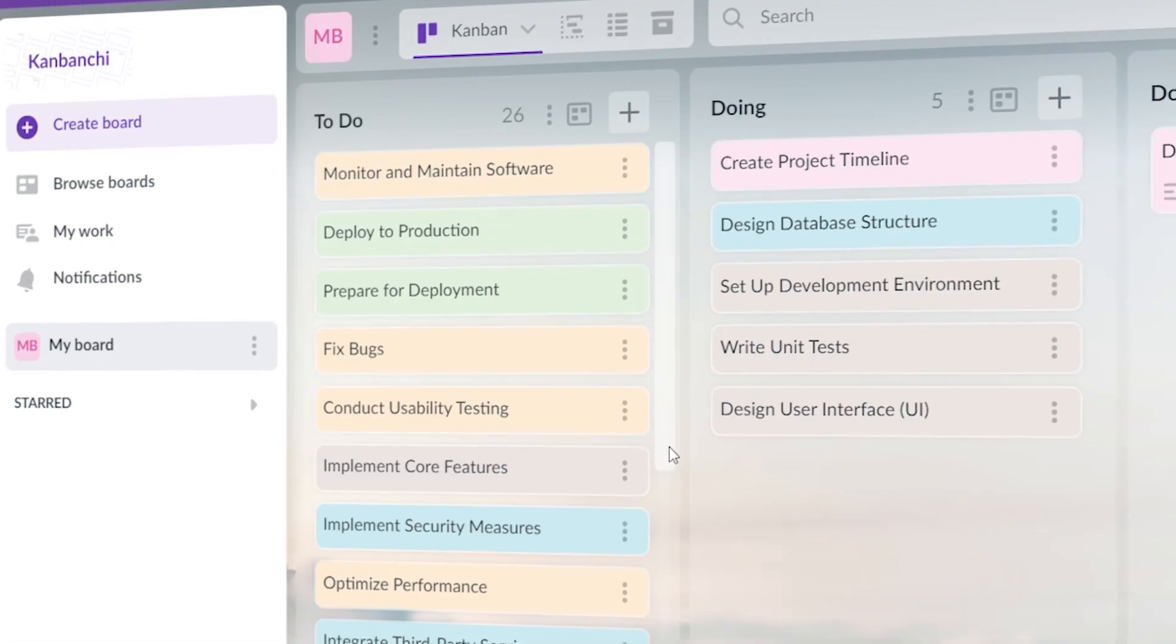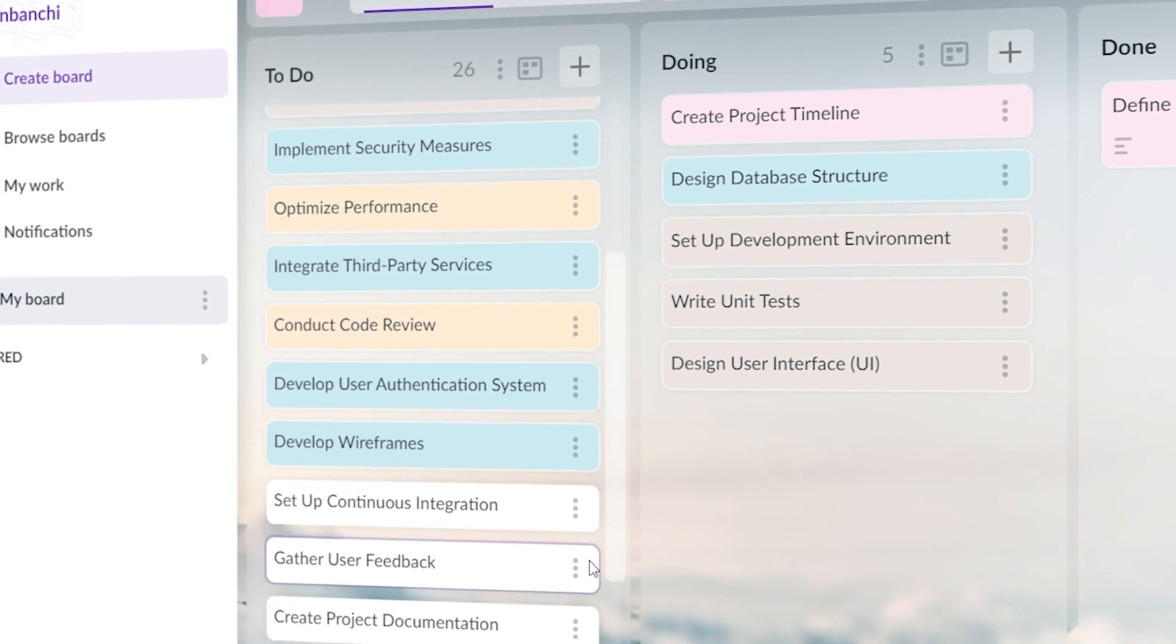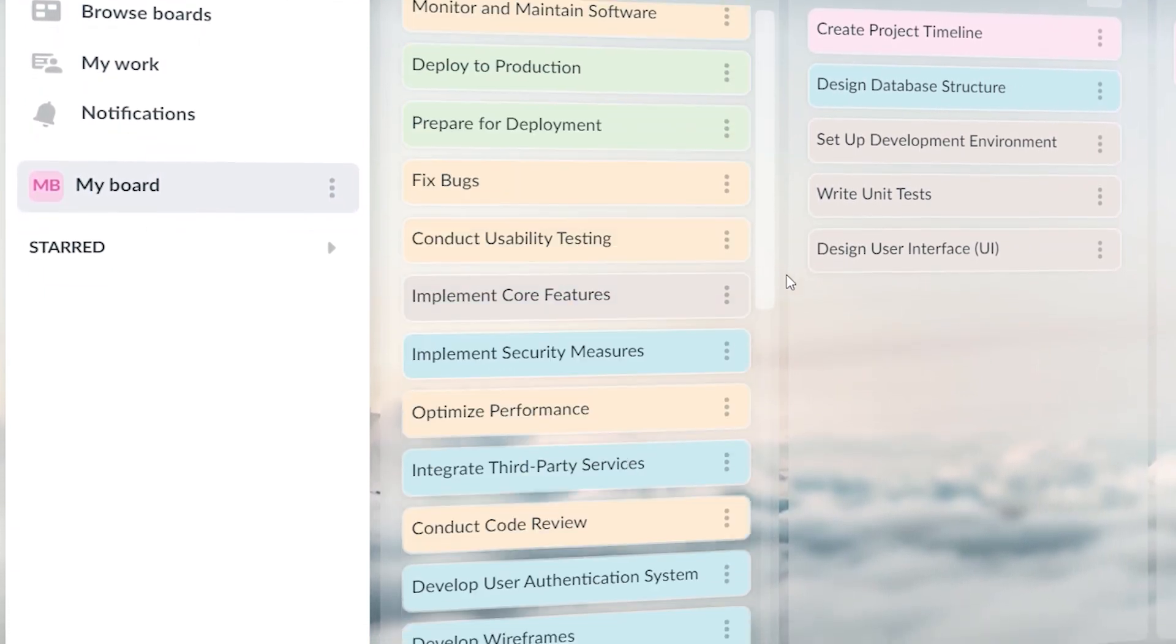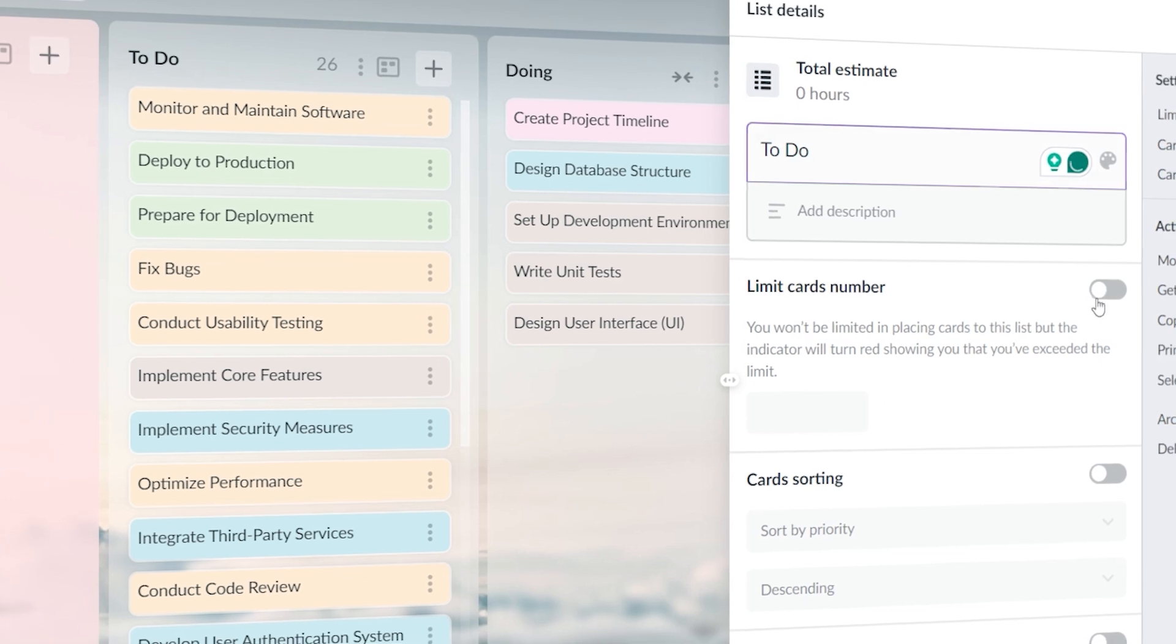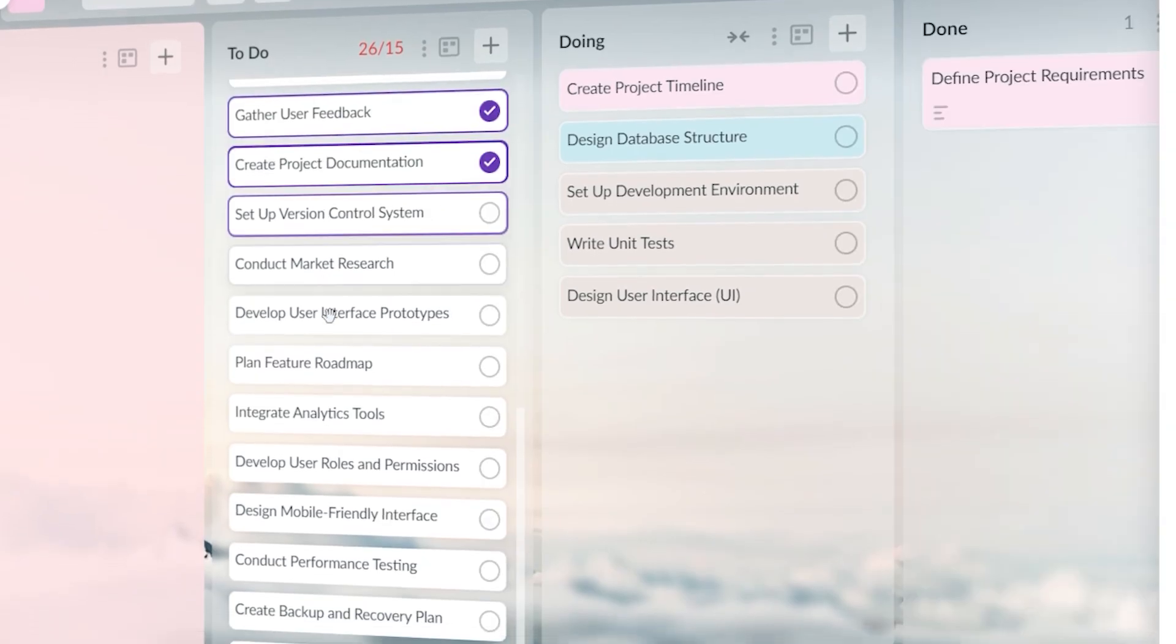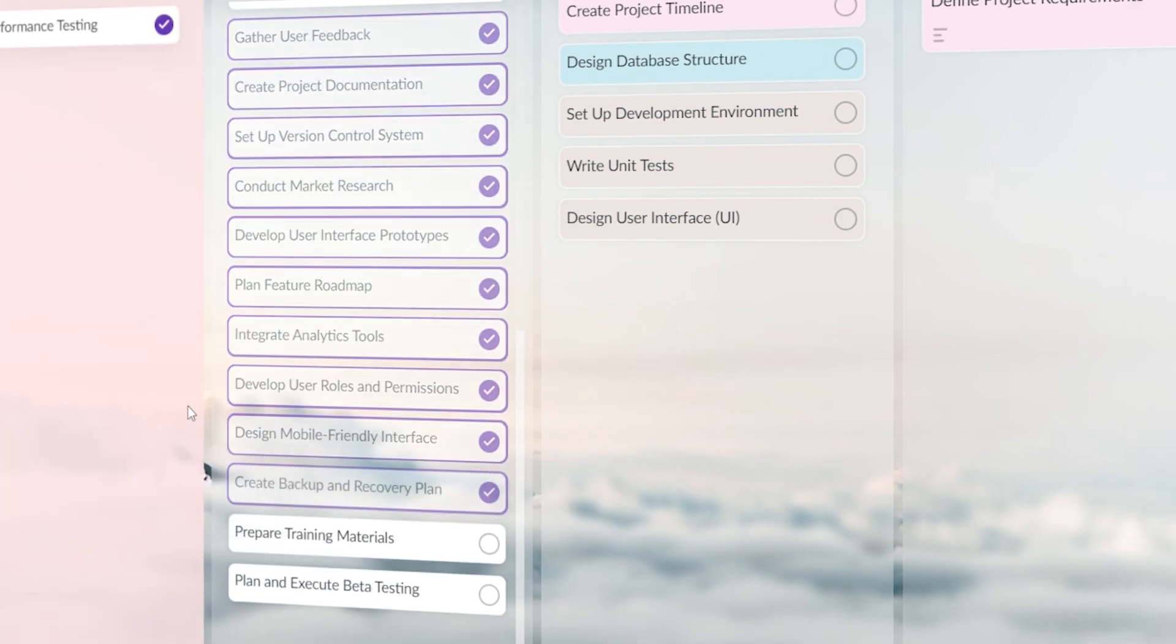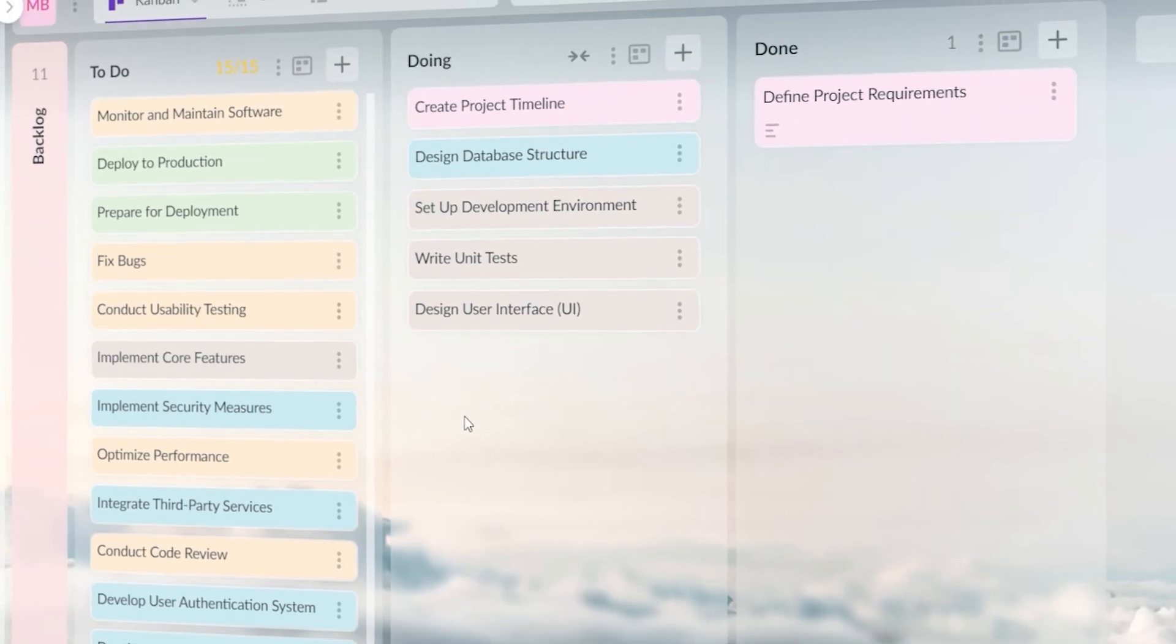At first, I thought the more tasks I put on the Kanban board, the more productive I'd be. But the reality was the opposite. The board became overwhelming and it was hard to prioritize what needed to be done. Instead, I should have focused on limiting the work-in-progress. Kanban works best when you cap the number of tasks in each column, allowing you to focus on completing tasks rather than just adding more. By setting a work-in-progress limit, I could have avoided that clutter and kept the board and myself more organized.